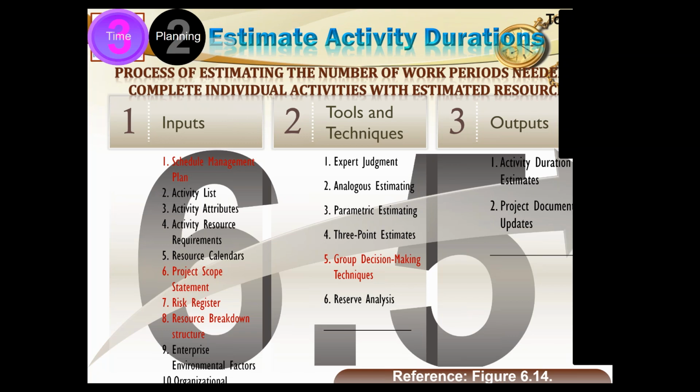How do you determine out of such diverse data how much time you should give to this activity? So normally people either go for the lowest figure if they want to do the project very fast. Just based on the assumption that we will be working faster, they will take the minimum time ever taken by anyone. But you see, there is a lot of risk because many people have not been able to do it in that small duration.